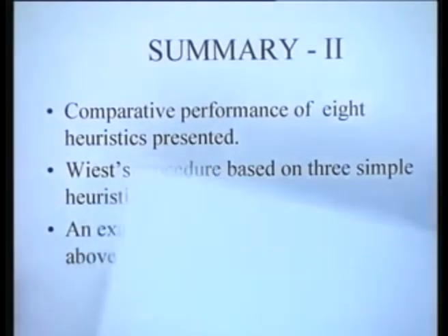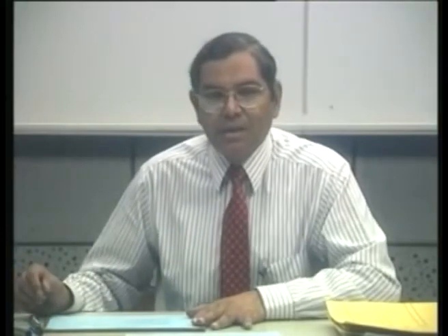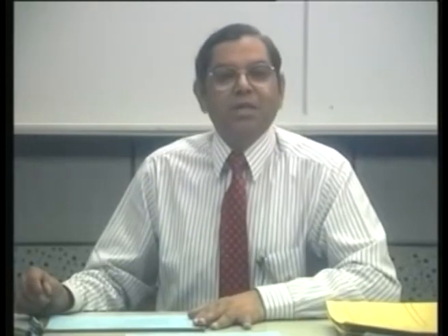And finally, some interesting things that came out from this procedure were that the notion of a critical path is not necessarily valid any longer. This is now replaced by the generalized notion of a critical sequence.